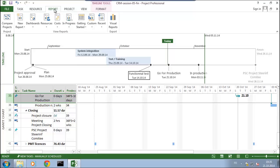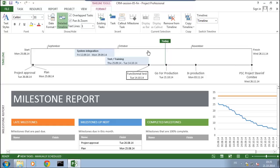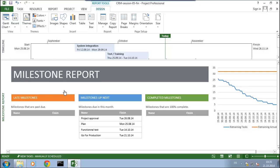In reports I have a section about what is in progress, and there is a special report about milestones. That milestone report tells us: are we late — are any milestones past due? For our situation, that's not the case. It also shows the upcoming milestones in coming months: project approval, the plan delivery, the date when functional tests should end, and the go for production decision.